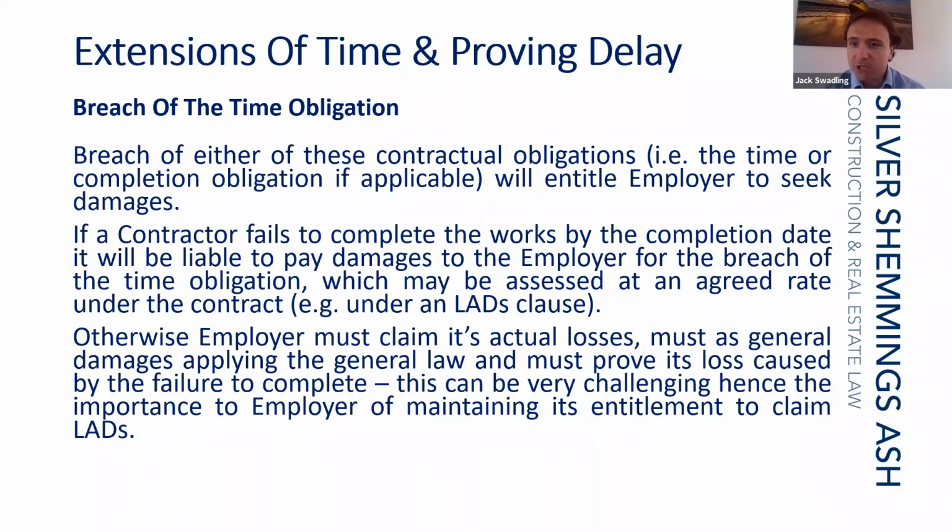Now, if there is just a stipulation for time, or if there isn't a stipulation for time in the contract and the contractor has just a reasonable time to complete the works, then if the work is not completed by the completion date or otherwise within a reasonable time, the employer will have a claim in damages for its losses caused as a result of the delay to completion. And this claim in damages will be assessed applying the common law.